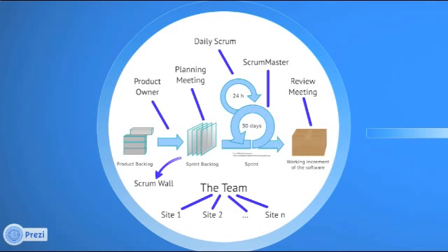A couple of rules here. The product owner is not allowed to change what is being done in the sprint during the sprint. Now, sprints are only 30 days long, usually. They can be 2 weeks or maybe up to 6 weeks or 2 months in a really big project, but somewhere around 30 days long. And within that 30 days, we freeze our assumptions about the world in order to proceed. So the product owner is not allowed to mess with things during the sprint.